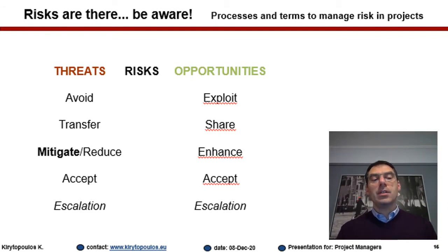And of course, acceptance. Make sure that there are two kinds of risks that might be accepted. The ones are the green ones, so this is obvious. But there are some not green risks that you might accept as well. Make sure that when you do that, you have a very good reason and you have documented the reasons why you do accept these risks while they are not green.